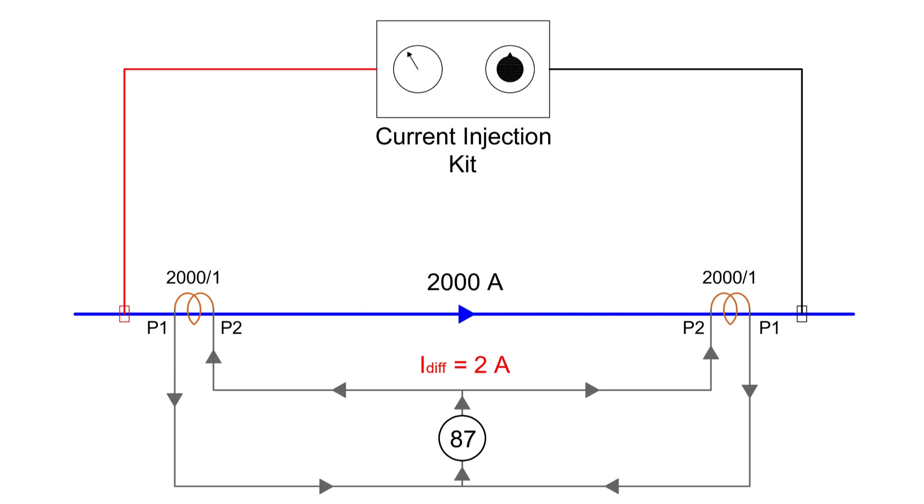By performing a primary injection test, we can verify the CT connections. If the differential current in the relay is zero, then CT polarities are correct.